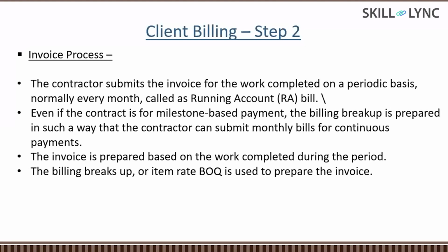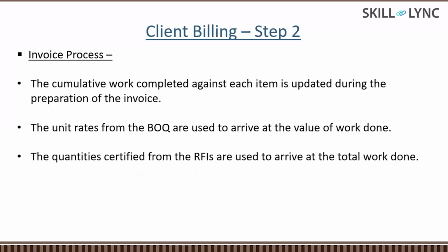Now we have understood that RFIs are available and they have to raise the invoice. They will be raising the invoice as per either milestone or item rate basis, whatever is available in the contract document. How will they be doing it? First of all, whatever work they have done in that period, they will make one cumulative quantity of it. So let's say for 30 days we have done the concreting work. For that concreting work, the shuttering work, the rebar work, the concrete work, we have got 30 or 50 or 100 RFIs, or n number of RFIs, then we will be combining all these RFIs